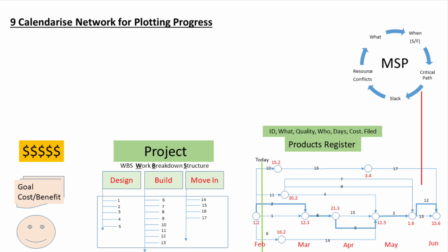That is, those activities that, if any of them are completed late by even 1 day, the project itself will be late by that 1 day. Or a critical path activity late by 1 week, resulting in 1 week late for the project.